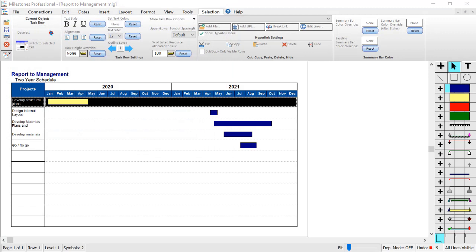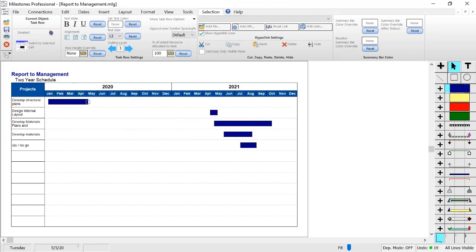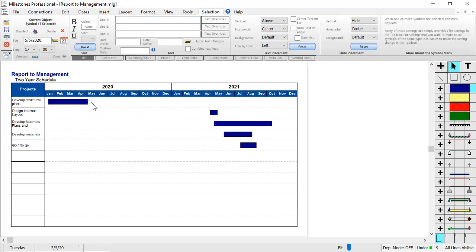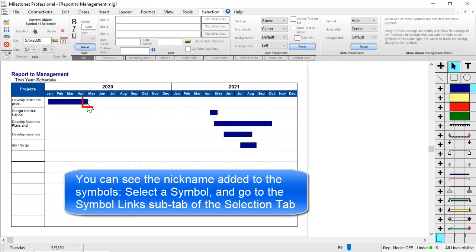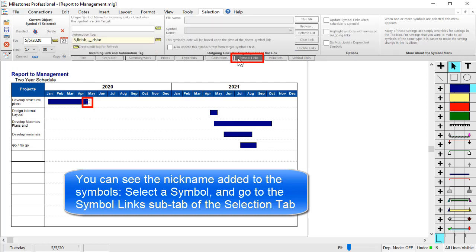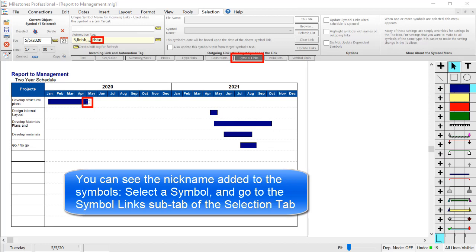Now you will see if you click on one of these symbols - for example the invisible symbol at the end of this bar - and then you can go to Symbol Links in the Selection Tab, you can see that the nickname was added to the symbol link, the automation tag. This lets Milestones know that this symbol is linked to whatever the D star nickname is set up as in the Create/Edit Refresh File List.